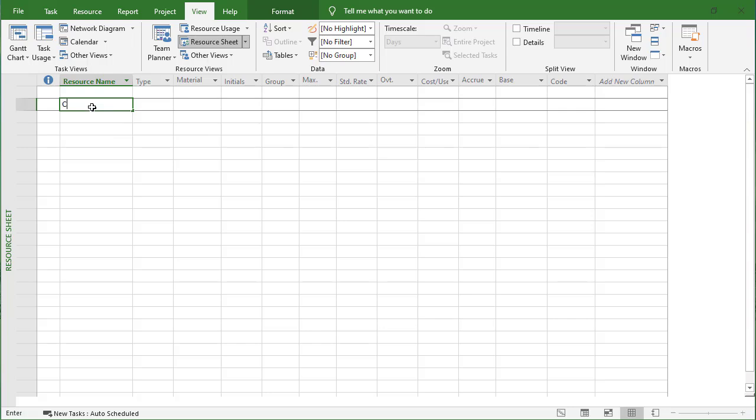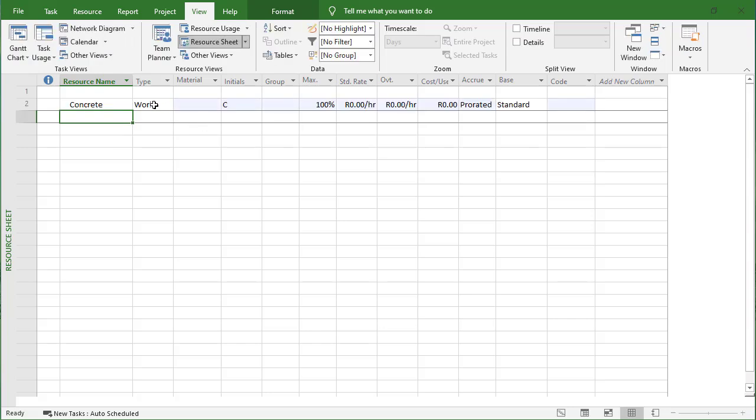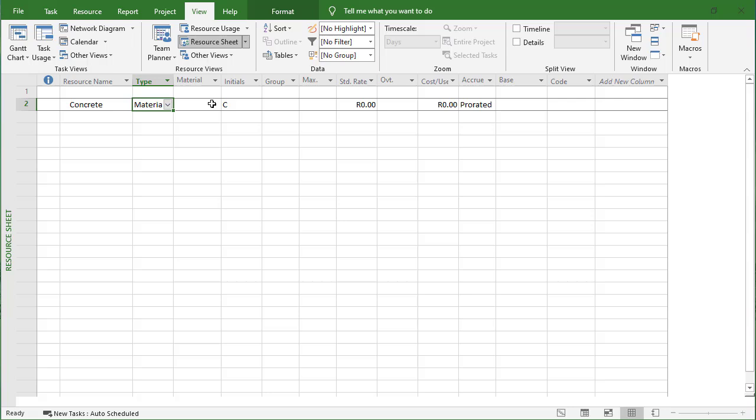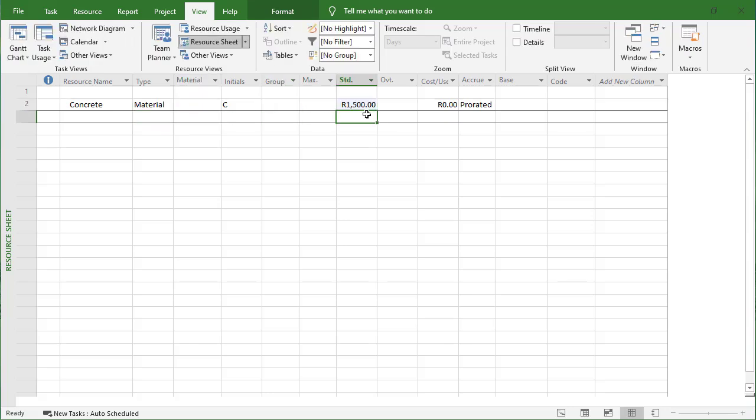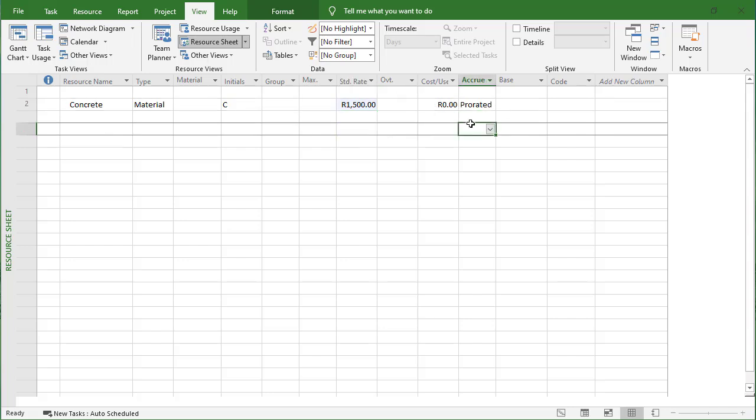First we're going to use concrete, which will be a material type resource, and then the rate will be 1500 rand. I'm working in rands - you can divide that roughly by 15 to get a dollar value. We're going to use prorated, cost per use nothing.